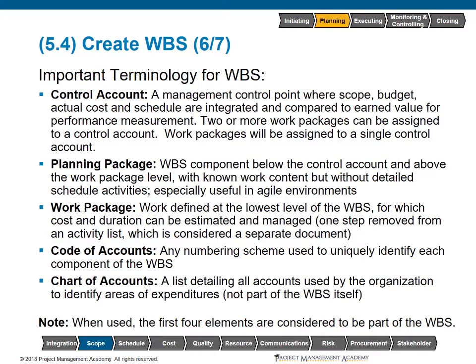At this point, I'll tell you that we need so many baby red potatoes, we need so much butter, so much salt, water, the stovetop, we need the pot, we need to go ahead and start preheating everything. And none of that is a deliverable. That is work that must be done, or those are resources that are required to create that component of the deliverable. So once you get to that mashed potatoes level, you don't want to fight it. You don't want to try and force it any further. You can just go ahead and accept that, okay, from here on, it becomes resources, it becomes activities. And we will do that further decomposition in a few more processes once we get to define activities.